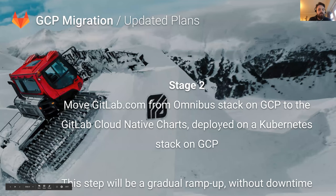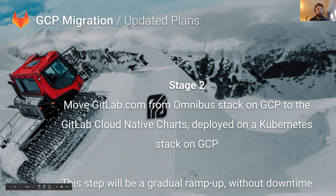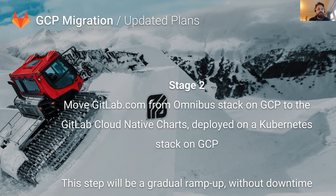In the second stage of the project, we'll stand up a Kubernetes cluster alongside the Omnibus version of GitLab.com that we'll already have running in GCP. We'll use cloud-native Helm charts that the build team are currently working on to provision GitLab.com workers in Kubernetes. These workers will share the same Postgres and Redis instances as the Omnibus version. Then we'll gradually shift traffic from the old cluster to the new one — this isn't going to happen overnight.